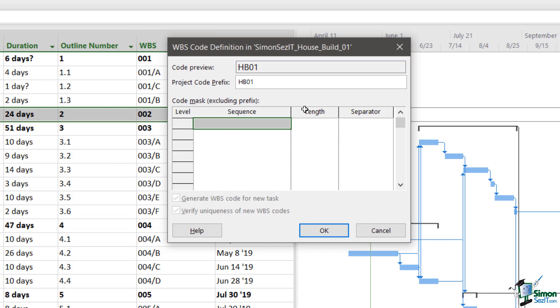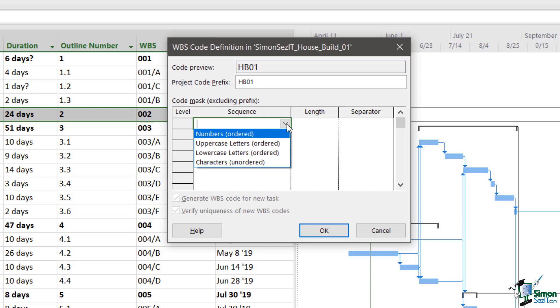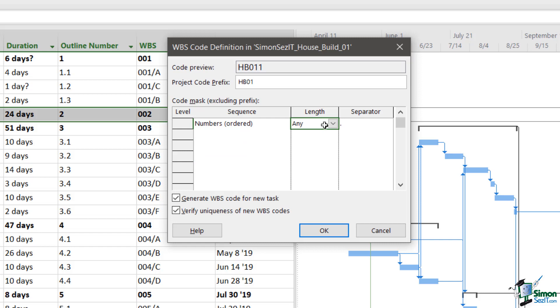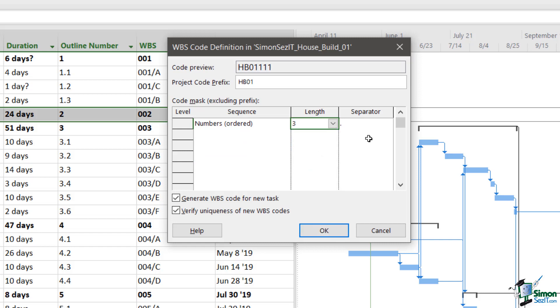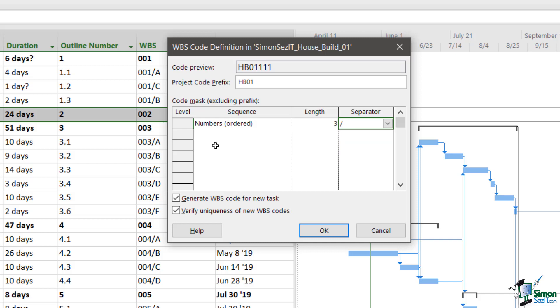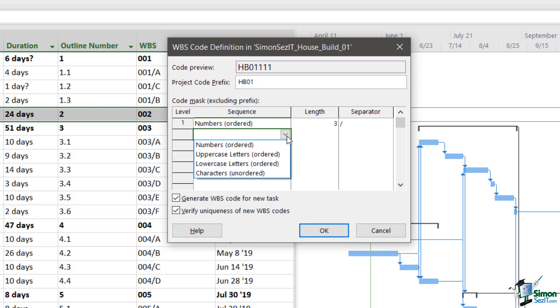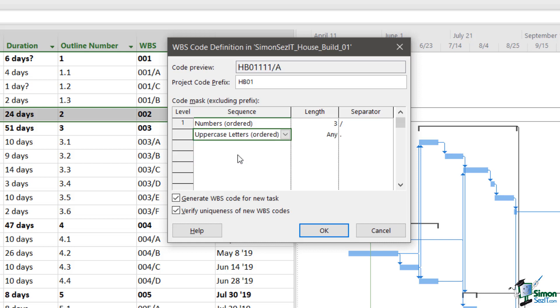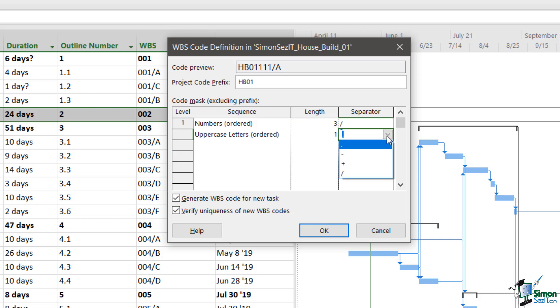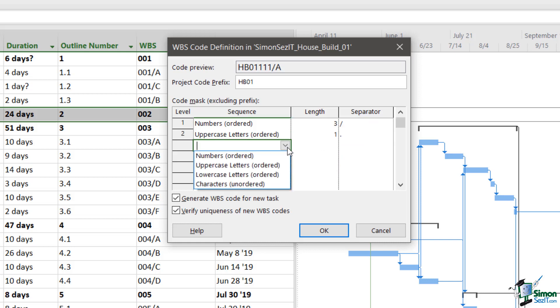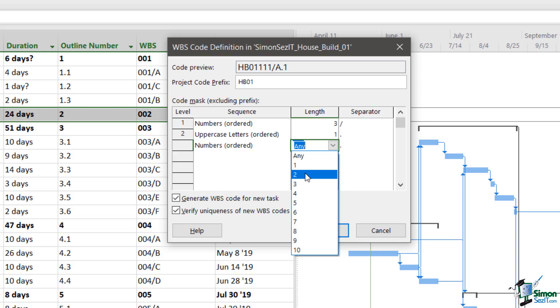And then what we do is we decide how many levels of code we need. Now I'm going to have three levels of code and the first level is going to be a numbering level. So when I click in sequence just here, I get a drop-down list with some options and I'm going to select numbers ordered. The length of numbers, well I'm going to say it's going to be three, and then I'm going to have a separator of a slash character. And you'll see what all of this means and what it looks like in just a moment. Now the next one, I'm going to use if I just click the drop-down again, and this one is going to be uppercase letters ordered, and maybe we'll just have one character just there. And then for the separator there, I'm going to use a full stop or a dot, which as you saw was the default. And for the third level, I'm going to go back to numbers ordered again. I'm going to say the length is two digits, and the separator there I'm going to leave that as the default as a dot.